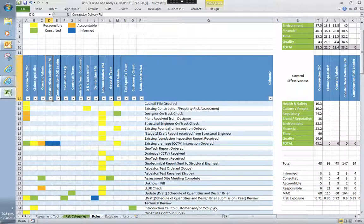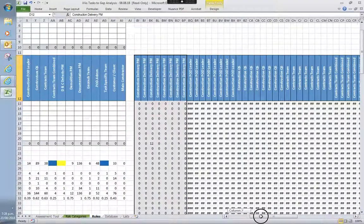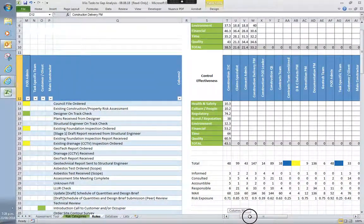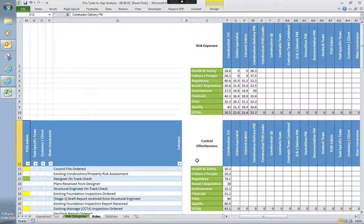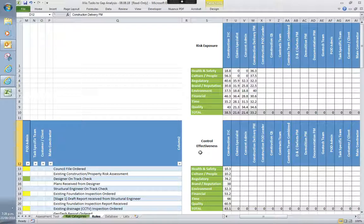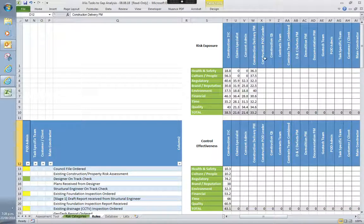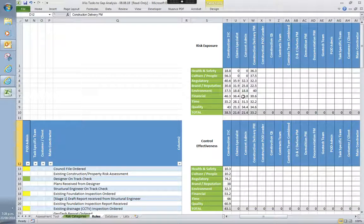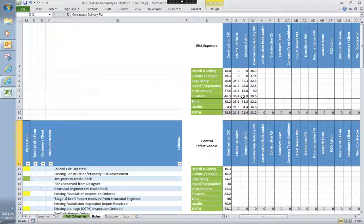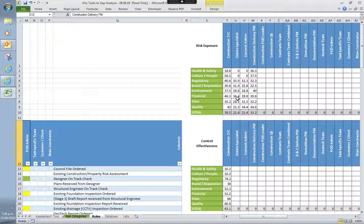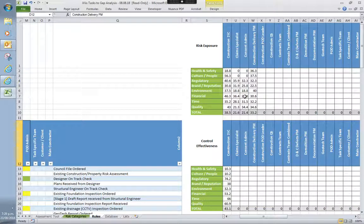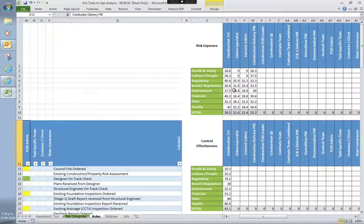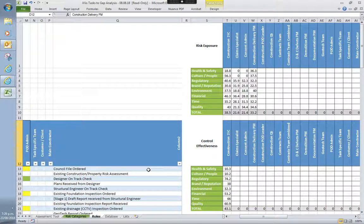But it can also tell you if we move to the side, I have a little bit more to work on. But what it tells you is where all the risk sits. So if you've got a health and safety or a financially critical program or project, you can look at where that risk sits with each of those roles. I've specifically looked into this due to the fact that I've worked with EQC and Fletchers. We had really good contractors who could do four or five projects in a year, did a really good job. But if you gave them 10, they started falling over. And it's very apparent today with people asking why are builders going bust in a boom situation. And this is why. They've got too much work and they don't have the right people or they don't have the right systems in place to manage it. And so hopefully what this does is tell them, hang on, I need to employ a few more people in that role. Or if we go back to the assessment tool, I need to actually get some more systems in place. I can't just ad hoc everything.